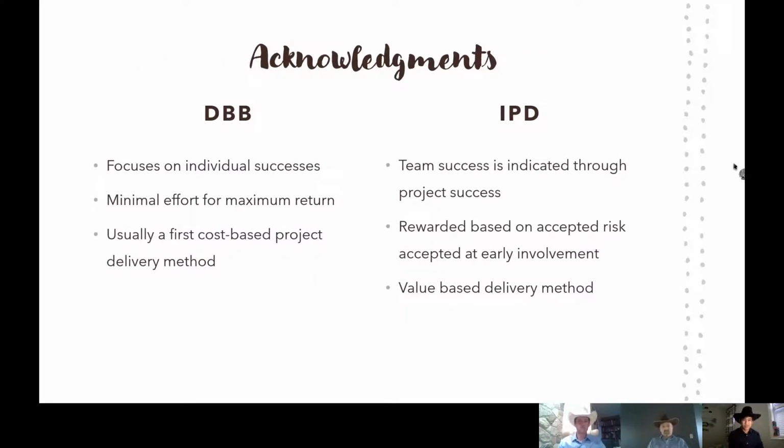Acknowledgements. Design, bid, build is very individual. It's focused on individual successes. It's minimal effort for the maximum return, usually a first cost-based delivery method. However, in IPD, team success is indicated through project success. It's rewarded based on accepted risk and early involvement, and it's a value-based delivery method as opposed to the first cost base of design, bid, build.